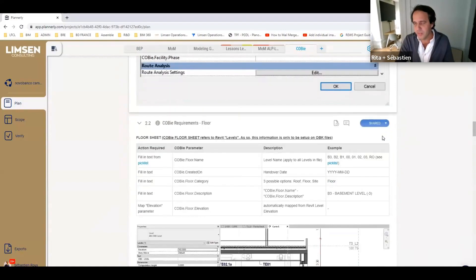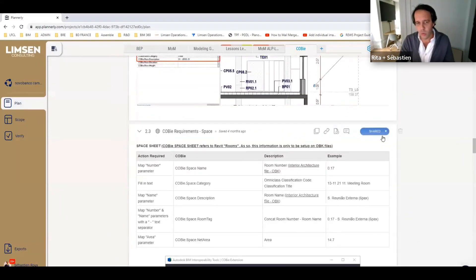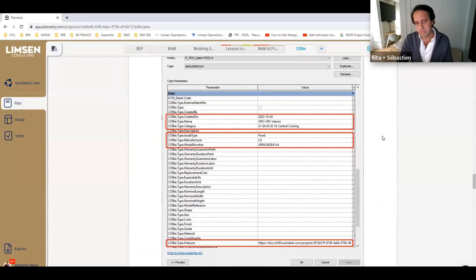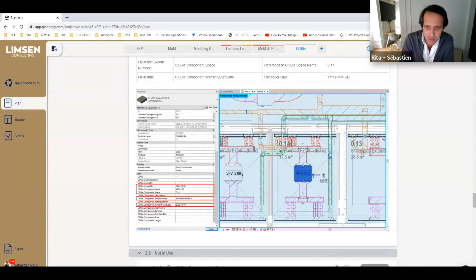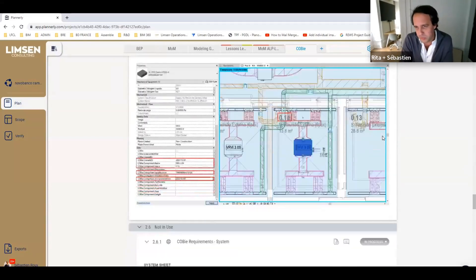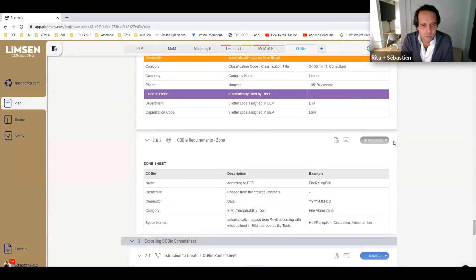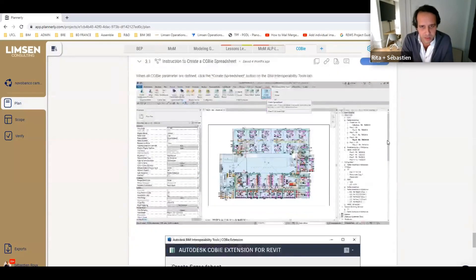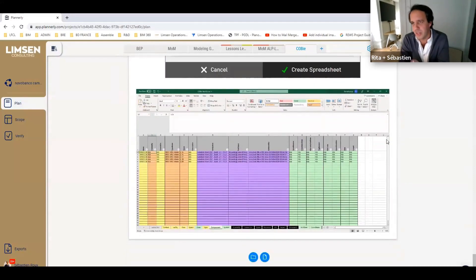I'm going to collapse it all, then expand it as chapters and expand the entire sections. What we decided when doing it on a real job is actually taking the sections that come from the templates and adding the implementation guidance for inside any software. So for example, here inside Revit, where exactly you would add the parameters that we are requiring as an as-built deliverable. We are actually explaining how inside Revit that should be done, but this can all be customized to any particular software. So this is an improvement made for a project-specific case - how to fill in the COBE requirements per zone, how to export the COBE spreadsheet from Revit, where to add the information when it's a component, where when it's type information.